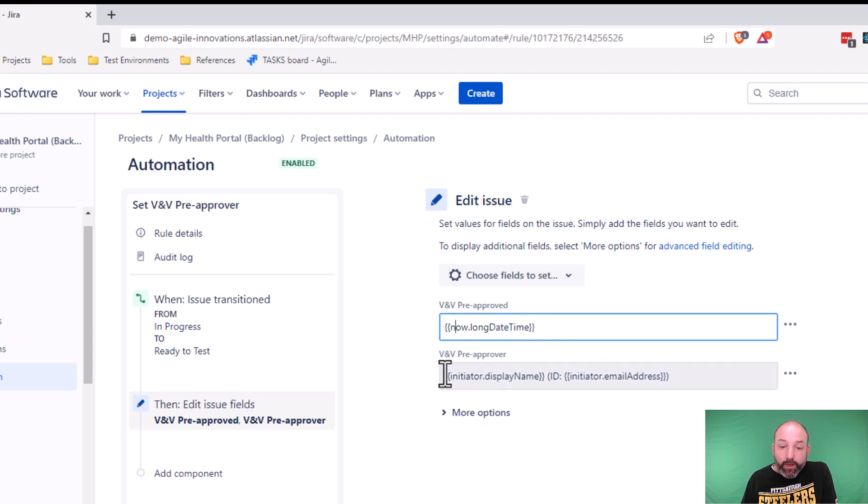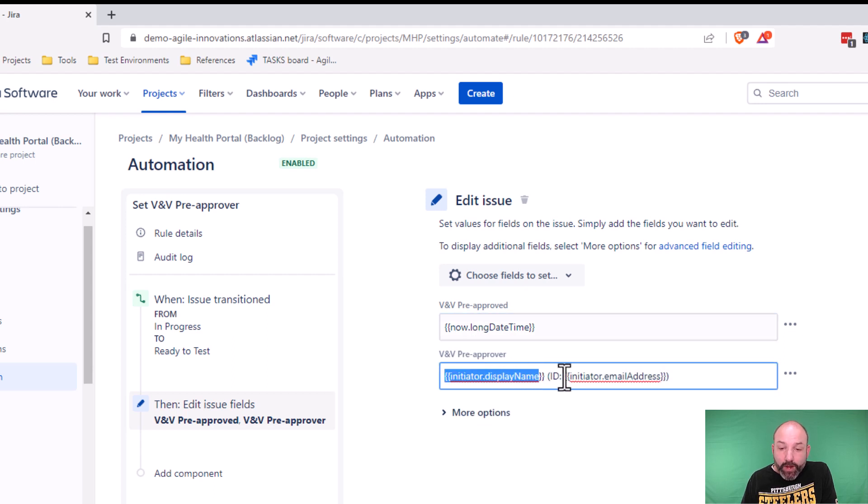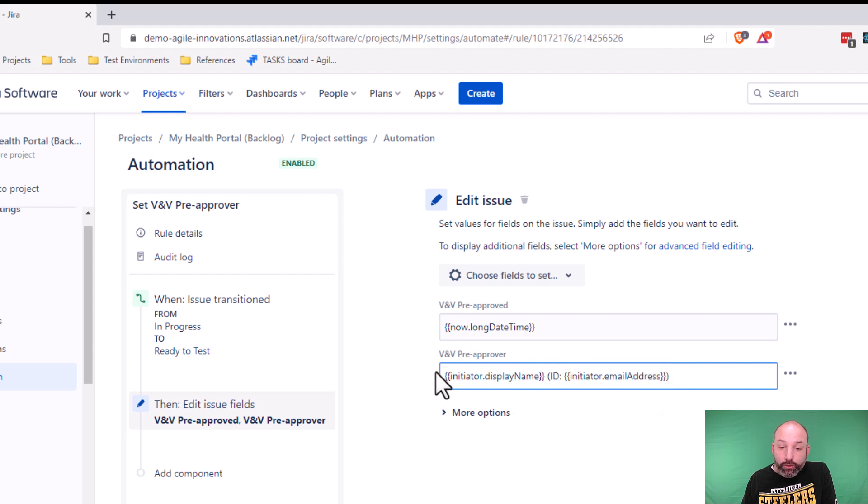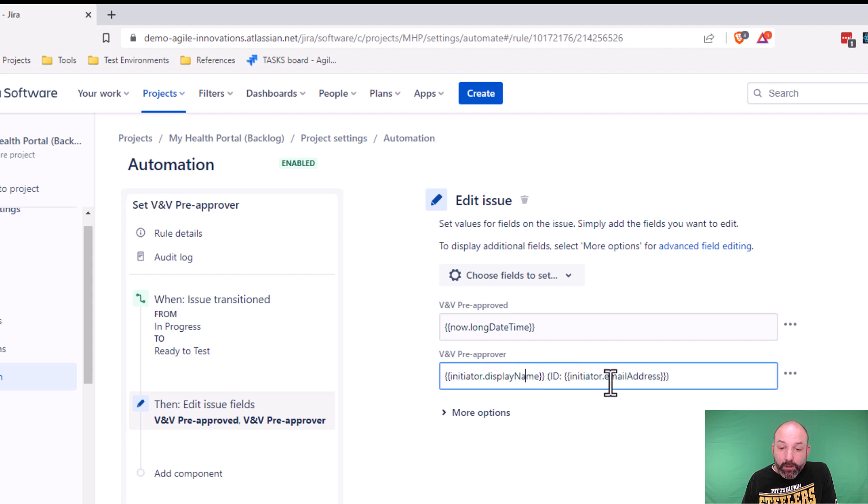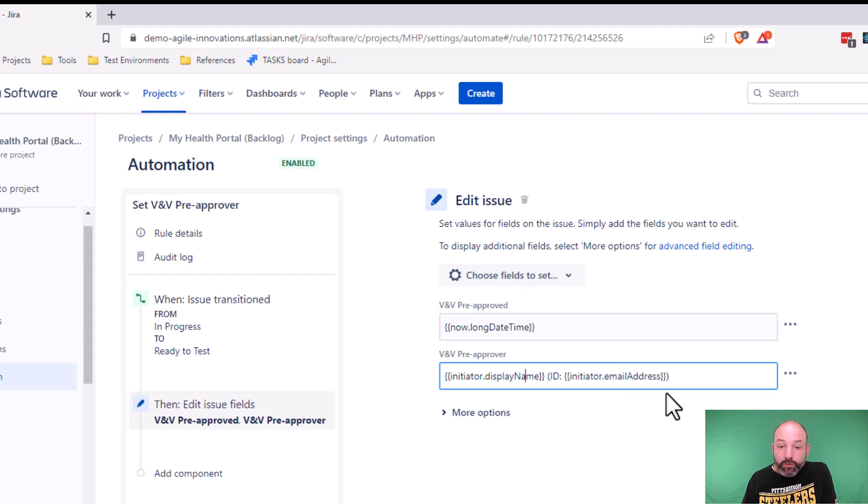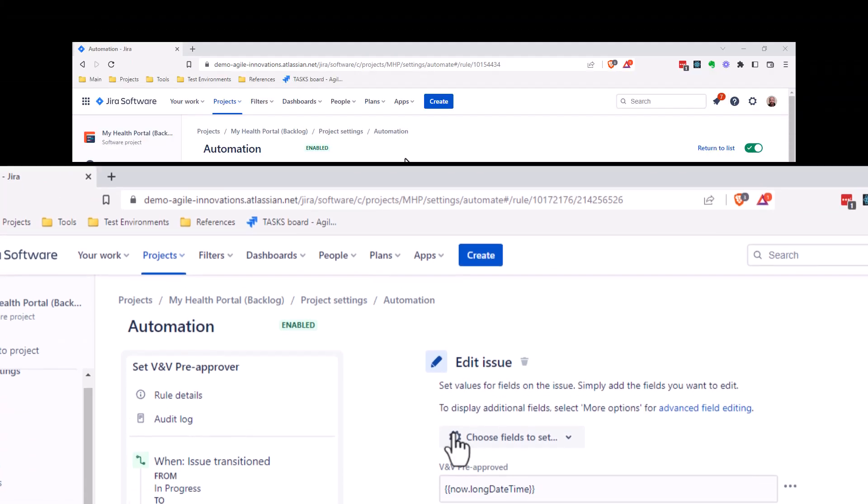And these smart values capture information about the current user that's initiated the transition. So this is how we're able to capture their display name, as well as their ID. In this case, I'm capturing email address as the ID, but you can also capture their JIRA cloud system ID instead.